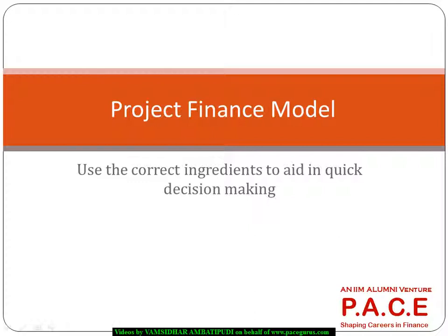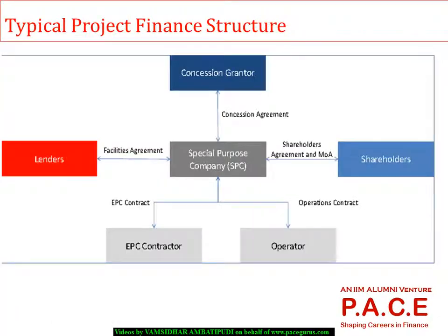And in phase 2, we would be even more interested in doing a what-if analysis, which is nothing but the sensitivity and the scenario analysis. By changing a few of our assumptions, we would be observing what kind of impact it has on the outputs, which are more like your rate of returns or the futuristic cash flows, in what years the negative cash flows and positive cash flows might come out. All these things can very well be analyzed, especially when we are doing an end-to-end project financing model.